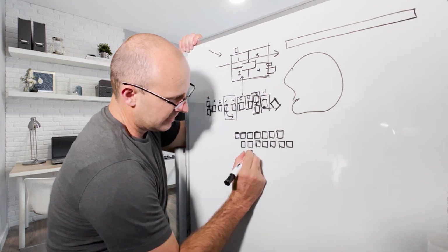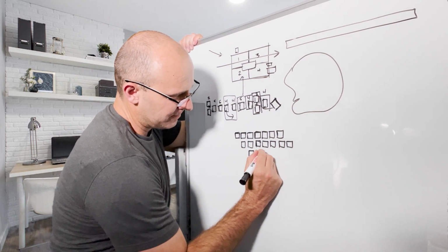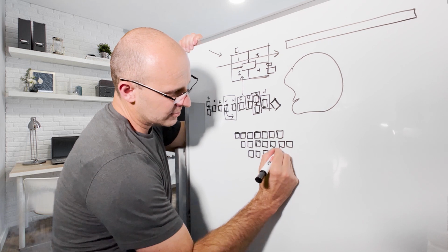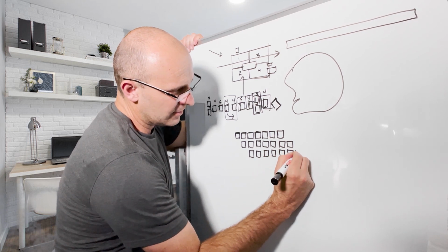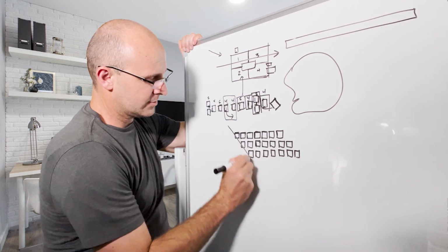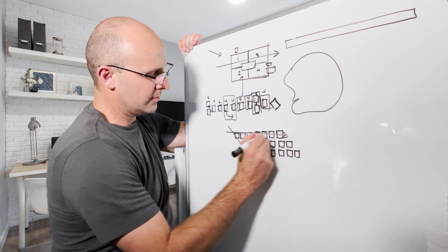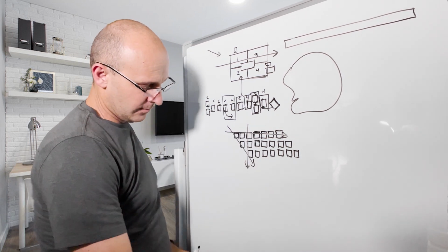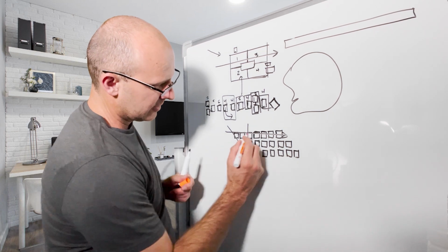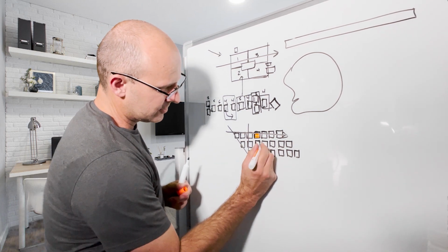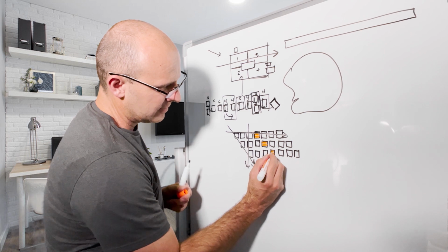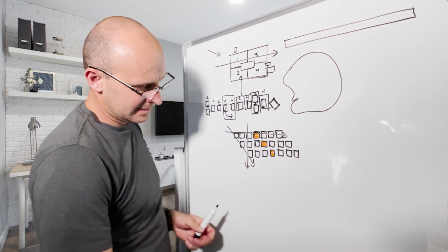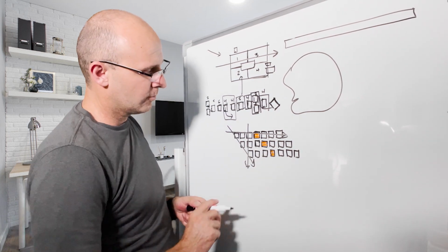So then this Takt plan is at a rhythm, and it shows all 3 types of flow, right? It shows trade flow, it shows workflow, and it shows logistical flow. So all 3 types of flow. And what happens is the trades, the colors in there show for the Takt wagons what's going on, and that Takt wagon has work packages in it.